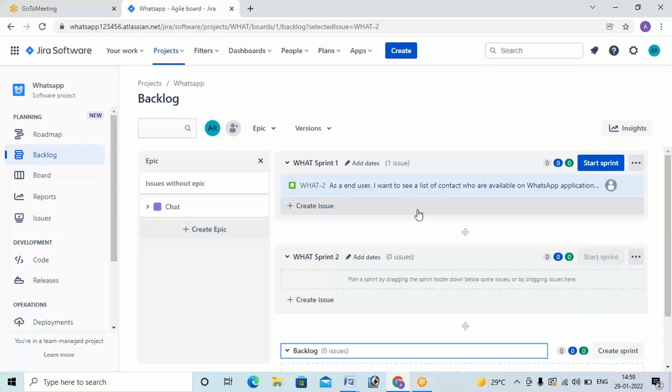Sprint is 14 days of planning, a duration to complete that task. Exactly, a sprint is a time box. Minimum it will last for 2 weeks, and maximum it will last for 4 weeks. When you are going to create the sprint, you have to drag and drop the user stories you want to push from the product backlog to the sprint backlog.